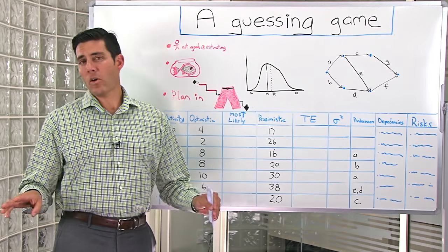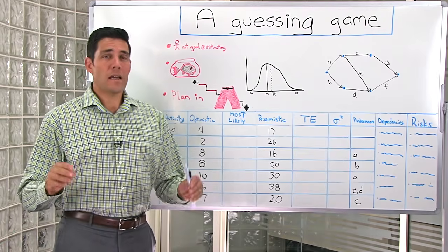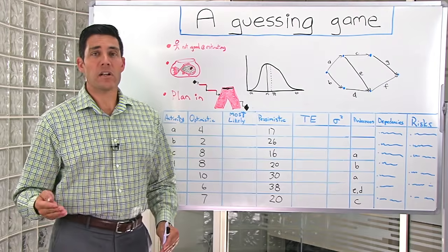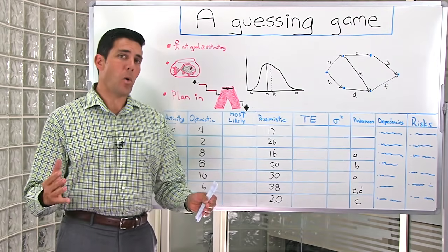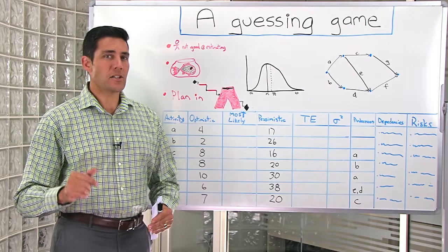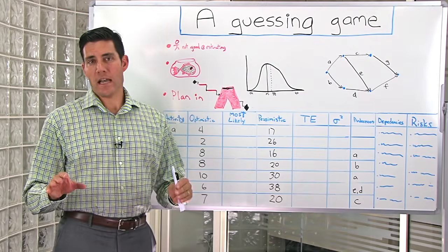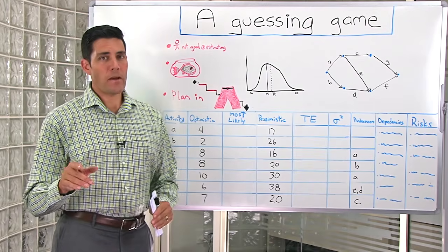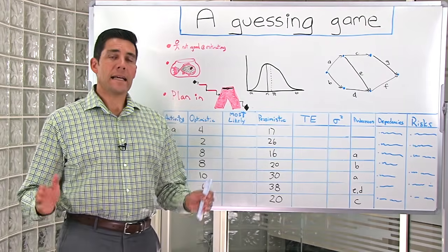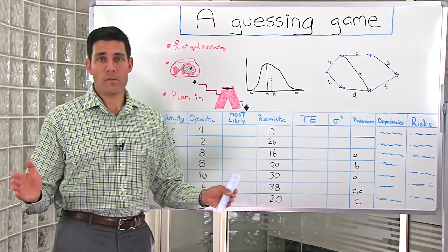First off, people aren't really that great at estimating activity task duration. Second off, people tend to fill the available time with the effort required to do a task. Much like a goldfish swells to its bowl, people tend to fill in that available time they have to complete a task. That's called Parkinson's law. Lastly, to have a reasonable chance at achieving a project deadline, project managers should definitely plan in slack in their project schedule. All right, let's get to the task at hand, which is estimating the effort for a particular task.